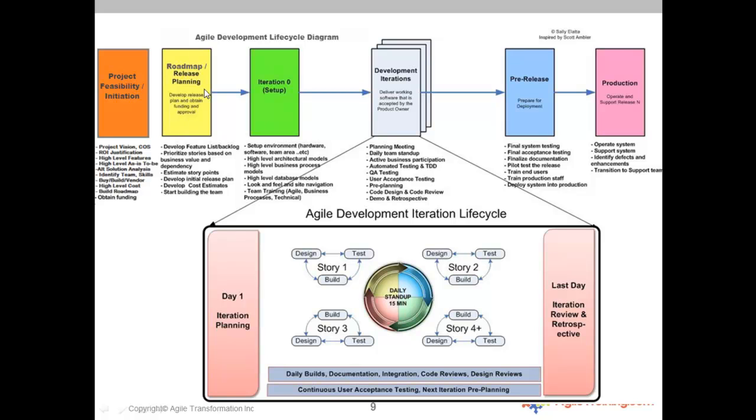You still do planning and requirements gathering, except in agile it probably takes 2 to 3 weeks, where traditionally it's 2 to 3 months of requirements gathering. I bet you still did some design and upfront architecture, setting up the foundation. In agile, this is just one iteration, where traditionally it might be another 2 to 3 months. And of course, there's still execution, where in agile, the main difference is we're still doing requirements, design, development, testing, and everything through each one of these iterations and sprints, as opposed to waiting until the end to do testing. So that's just sort of a comparison of waterfall versus agile as it relates to this model.